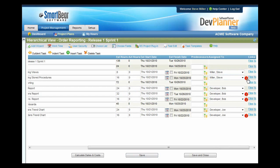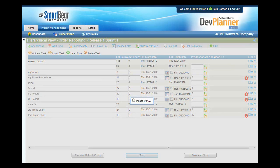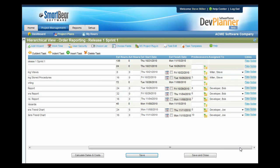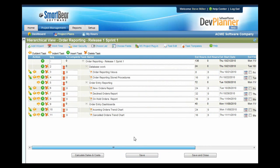Notice that Steve has been over-allocated for these particular days because we're having him work on two items on the same day. To prevent that, we can set up predecessors so that one task follows on to the other, allowing things to work sequentially. Then we'll press Save again — that cleared up our over-allocation, so we're in great shape for this particular project plan.